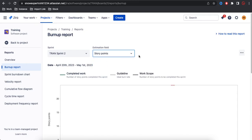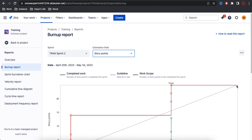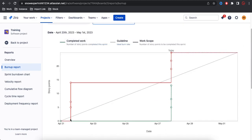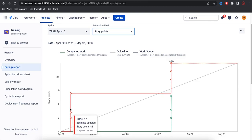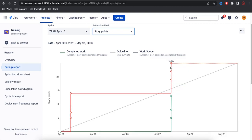Going back to Story Points — this is the story point view, and here is the end of the sprint, so this date will be the end of the sprint. You can see there is a red color and a green color. In red, you can see the story estimates — whenever a story point is updated or decreases, it is shown here. In green, it shows when a story got completed. The three dots indicate today's date when I completed this issue or story.